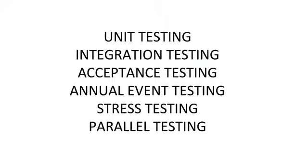The key success factor in this whole project was the fact that we spent 16 months testing this system. There are very few technologies, new technologies, that are integrated into the workplace that get that amount of testing. And that's a big benefit to the lift and shift opportunity, because we weren't trying to develop new technologies. So we spent the whole 15 months testing this.